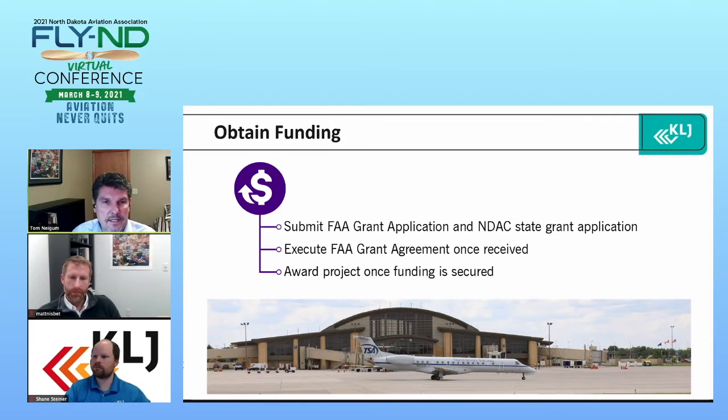So a lot of times what the sponsors do, they'll put in a state grant application based on estimates, and then following up the next year, if there's money to turn back, you turn it back when we're closing it out, or if you need more, you can request more from them at that time, a supplemental.